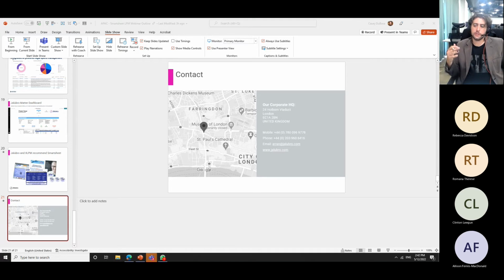What we would do first is sit down and take a look at what are going to be the quickest wins, the quickest things that you'd want to implement. For example, a ticketing system can be implemented very quickly. I mean, literally within 3 weeks, we could have the ticketing system piece of it going. The project management piece, on the other hand, is probably going to involve not only the presentation of the tools to you, but also the collection of input from your team as to what types of templates they would want to see, and a little bit of change management associated with moving their current process, where every attorney probably has their own process that they like to keep, into a more standardized process. Now that type of project is sitting in the 3 to 4 month time range to implement that type of deployment.